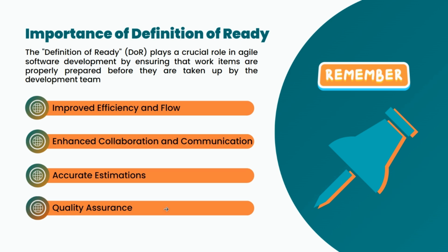So you get the story from the product owner, and when you get the story from the product owner, the workflow status of the story will be to do. And when you actually start the work, you move the story from to do to in progress status. But I have seen in corporates, even if you are using a private Jira project on your personal basis, then you can create a new workflow between to do status and in progress status, and you can name that workflow as ready.